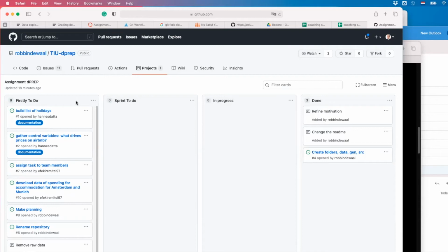So something that you need to learn is that when working with Git, you don't need meetings which last 4 hours. You can actually meet in 15-minute meetings and do a very, very quick round. It's better to meet multiple times in a week than to have massive meetings. Sometimes with my teams, we just meet for 15 minutes, really, and just look at what has been done, reprioritize, and then off we go. Or we share our experience.